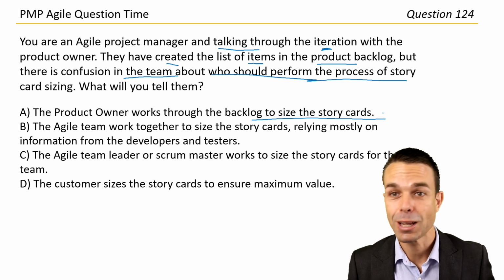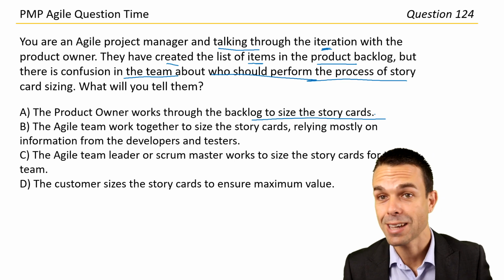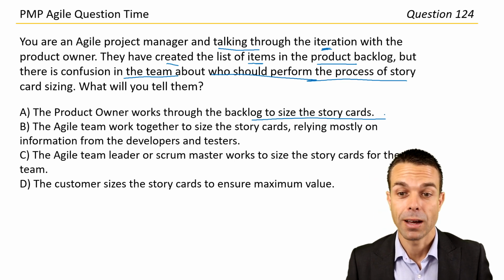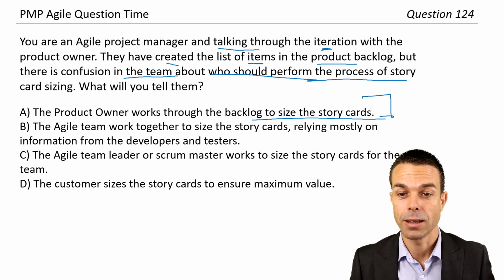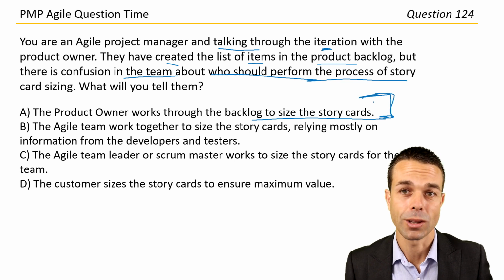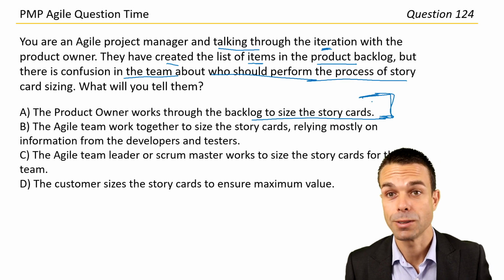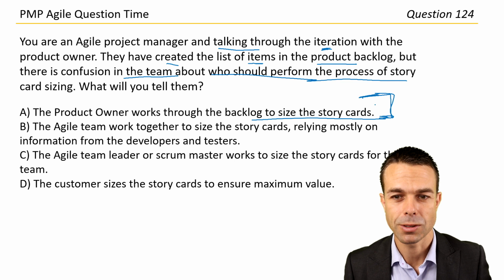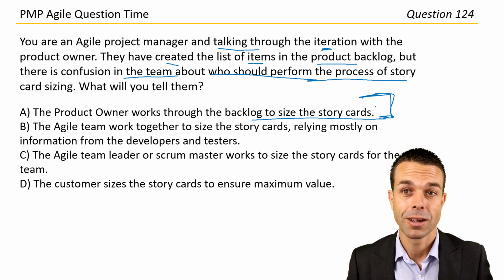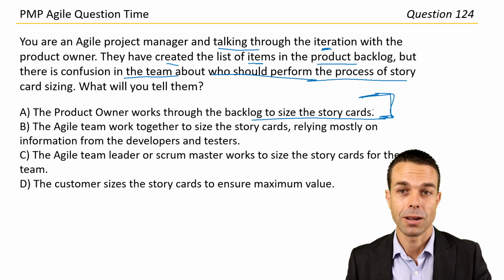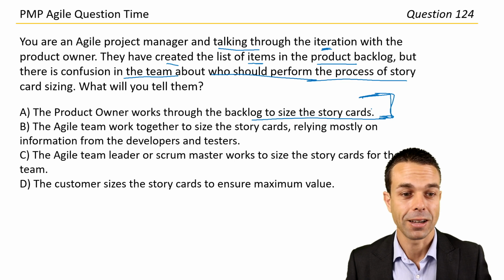We want the developers involved, the testers involved, business analysts, scrum master even, a product owner, all of the people together. But most importantly, the people who are doing the work, so developers and testers, in most circumstances, will give the best and most accurate advice for sizing these cards.